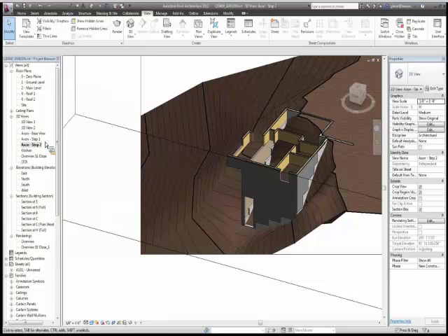And the issue is, if we think about there being a sequence of operations and the house being built up, you can think about having a construction schedule that will have different task IDs or different task numbers or a sequence number that we can assign to all the different elements. And we can map that number to all the elements. The only thing is you have to come up with some sort of scheme in your own mind, assigning numbers to the different elements controlling when they appear.